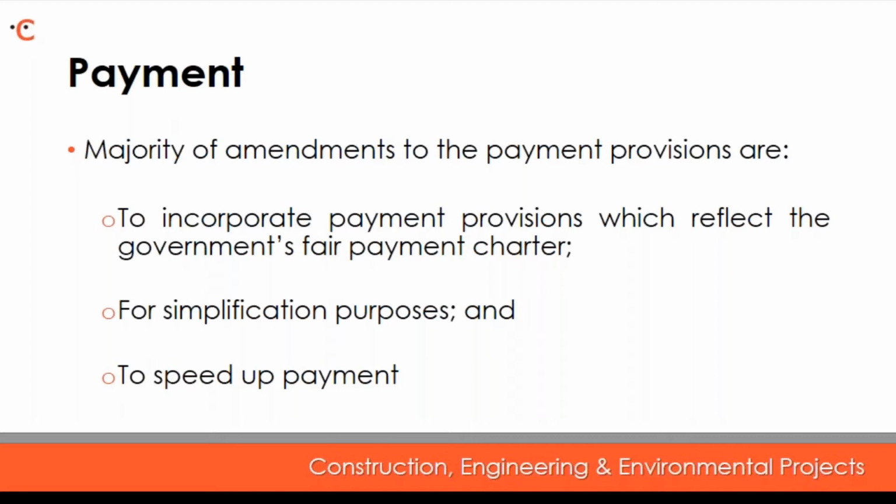If you are making bespoke amendments to the standard forms of contracts, care should be taken to carry out any bespoke amendments in the main contract through to any subcontracts and sub-subcontracts to avoid creating an inconsistent payment regime. So over the next couple of payment slides, I've used the JCT Design and Build 2016 edition contract as an example.